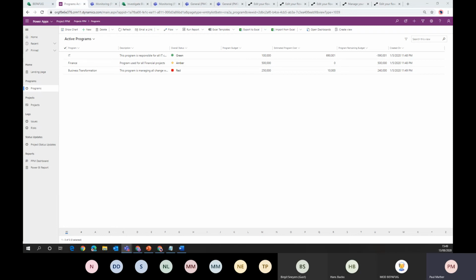But with the power of the Power Platform, you've got that ability to copy that data and do any calculations that you need there. Time-phased data, yes, there is the time-phased data that is stored as JSON in one of the fields within the tasks entity. So you do have that breakdown of how many hours per day for that task. That is in the CDS entity, and I do have a blog post on that, an example report for getting that data out, on my blog, actually.